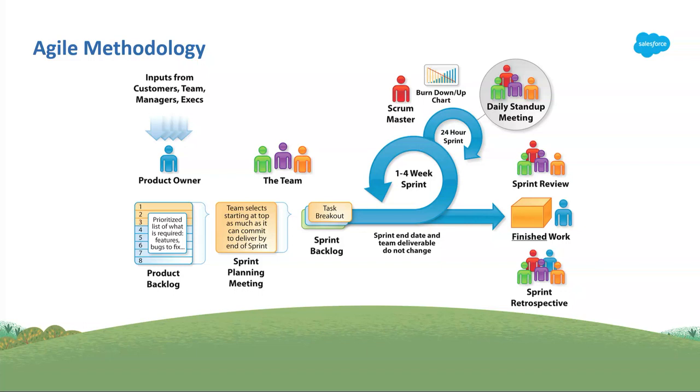Now, you have 2-week sprints, so the sprint team is going to take the items from the backlog and execute the development work. Every day you have a standing meeting, where you say what the hurdles are and what you're working on for the day. After 2 weeks is completed, you go back and do some testing with the end users, and at that point, you do the deployment as well. Towards the end of the sprint, you may have a sprint retrospective meeting or a sprint review meeting. These are generally used to help better future sprints as well.